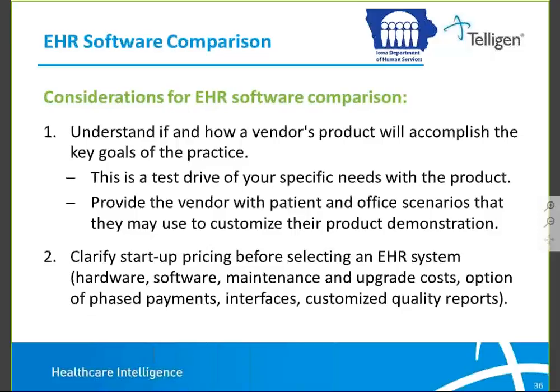Number 2, clarify startup pricing before selecting an EHR system. So that's going to take into account hardware, software, maintenance and upgrade costs, option of phased payments, any interfaces that you might need, or any customized quality reports. So these are things, of course, that you're going to want to be clarifying and getting in detail before you actually select your system.